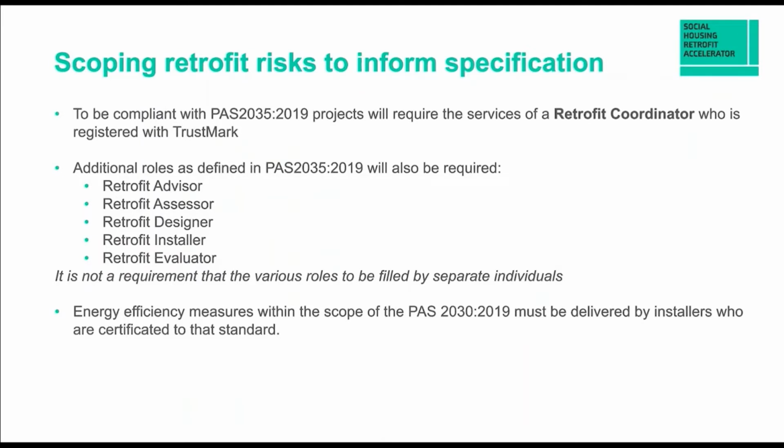The coordinator will stay in touch with the resident to ensure that energy bills and heating use are in line with what is expected after the retrofit work. So they're there to ensure that everything from the assessment and design of the retrofit, the installation, the handover, and then checking that it's performing properly. That's the role of the retrofit coordinator.